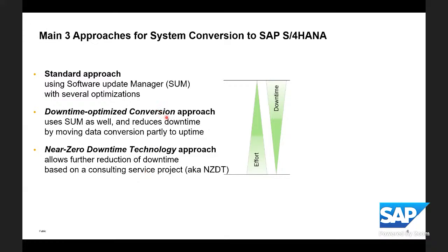Now, in the middle, downtime optimized conversion, that's an approach that educated consultants out there at the customer or from a partner can do on their own as well if they are educated. So no costs for a consulting service of SAP. Still, you have more effort because you need more preparation, more testing, more test runs especially. And we will see later why this is the case.